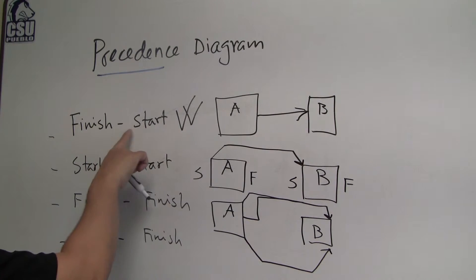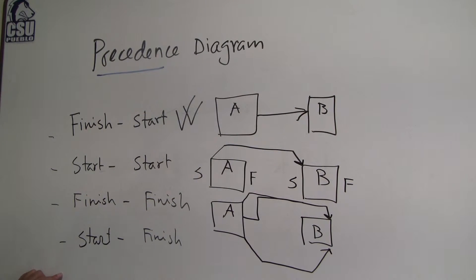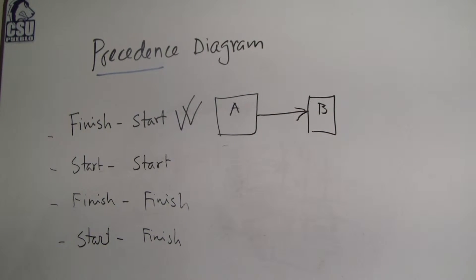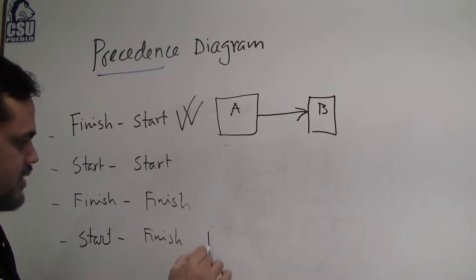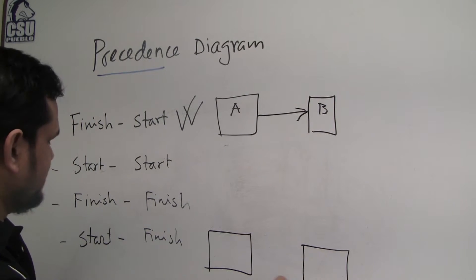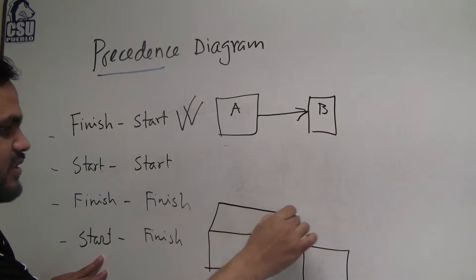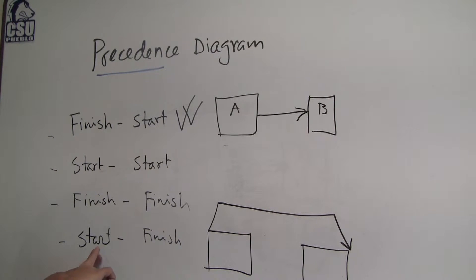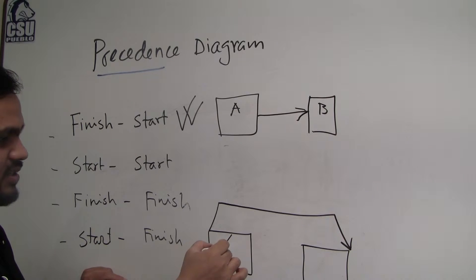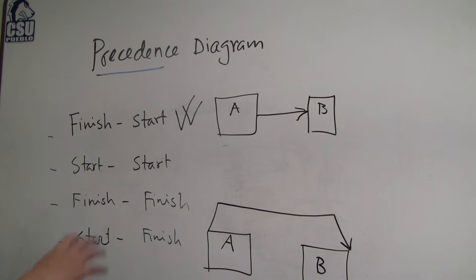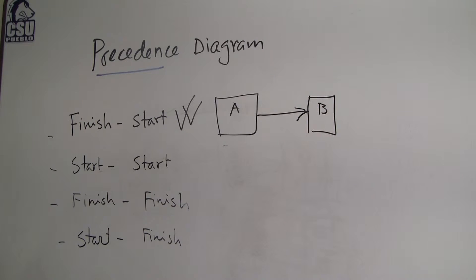Finish-to-start is the most common — once A finishes, B can start. Now, start-to-finish is not so common; we do not really use it. It means once this activity starts, the other can finish. So if A starts, B can finish. It is uncommon, but the precedence diagram can accommodate it.